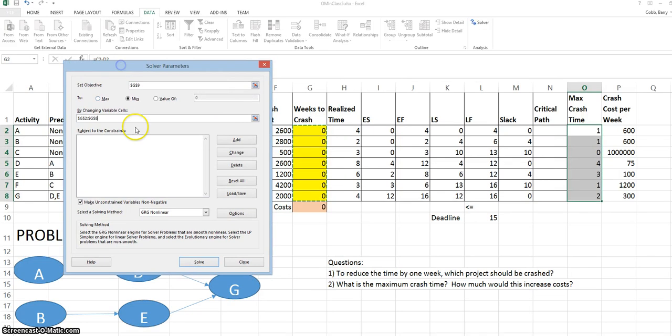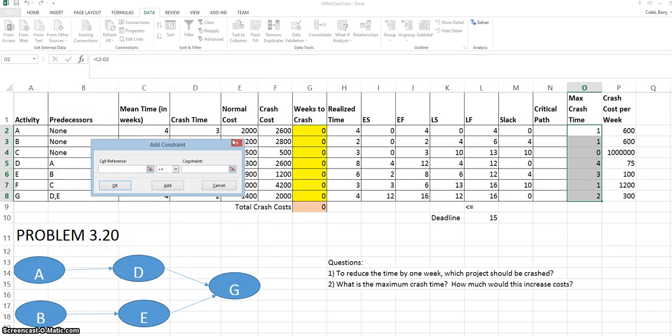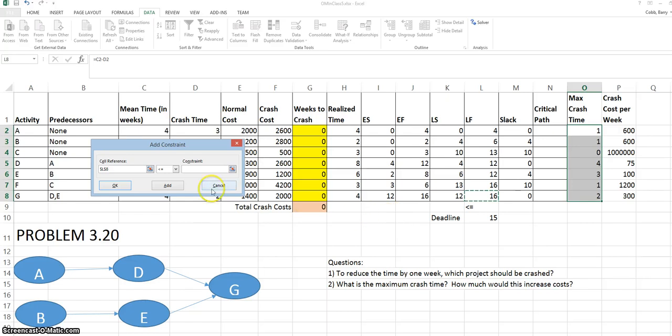Now we need to add constraints. The constraints box is in the middle. We click Add. And to add the deadline constraint. In the constraint window, we put the project completion time in the left-hand box. We maintain the less than or equal to symbol. And we put the deadline in the right-hand part of the box.